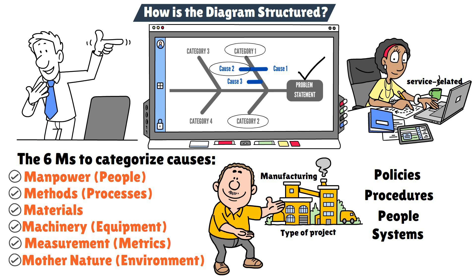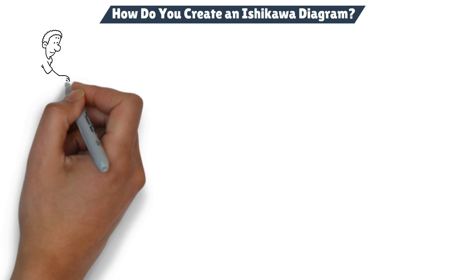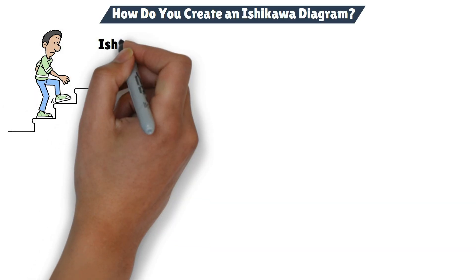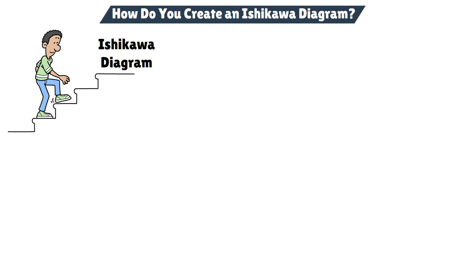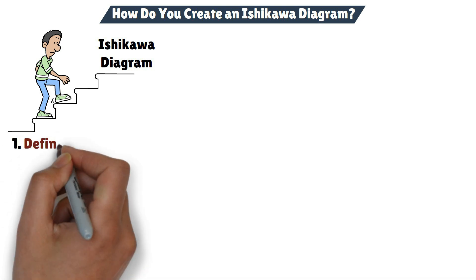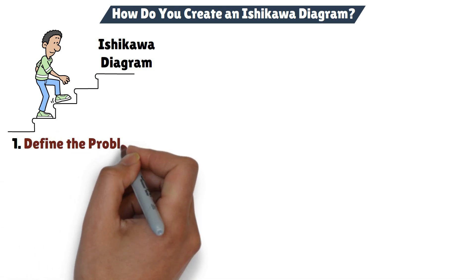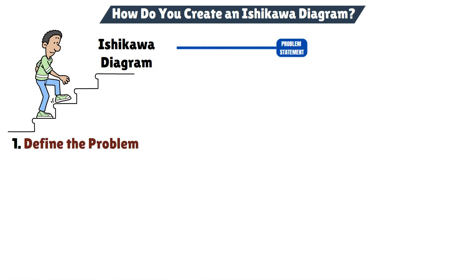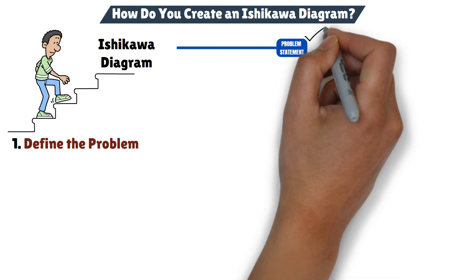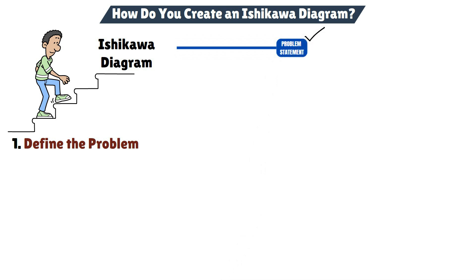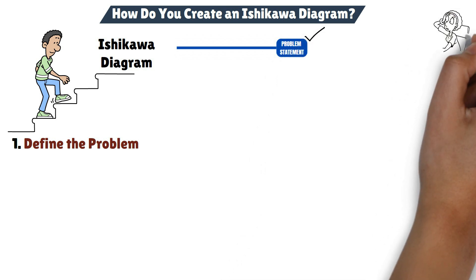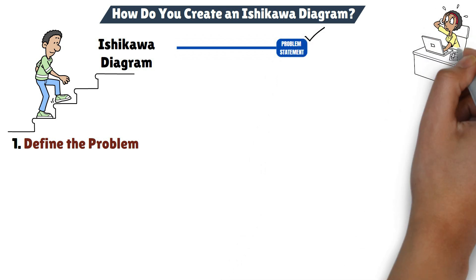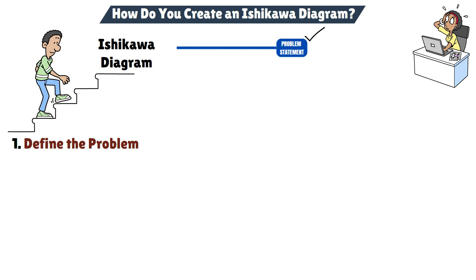It can be adapted to fit almost any type of project or problem. Now, let's walk through the steps to create your own Ishikawa diagram. Step 1: Define the problem. Start by clearly defining the problem you're facing and place it at the head of the diagram. Be as specific as possible — a vague problem definition will only lead to vague solutions.